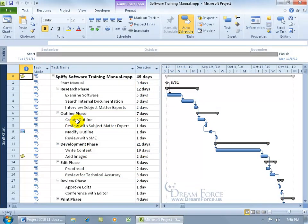A recurring task is a task that occurs over and over again at regular intervals over the course of the project. For example, I want to insert a recurring task like for my project status meetings that happens every other Tuesday.